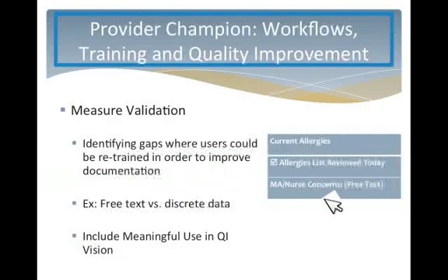During a provider and nursing team meeting, we determined that the nursing team would be the ones to always verify allergies. We talked to the staff about this verification being at the beginning of the visit to ensure it was addressed, and we showed them exactly where to document and check off that allergies were reviewed. We ensured that our QI vision incorporated meaningful use measures and language, as that has become a major focus in our health center.